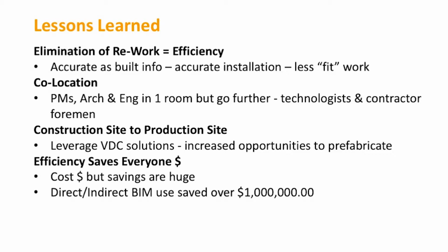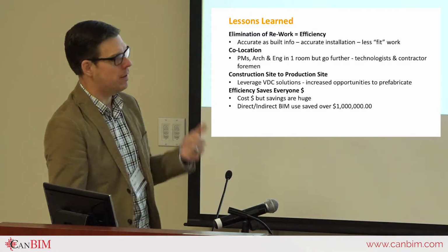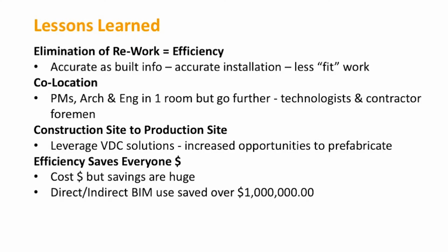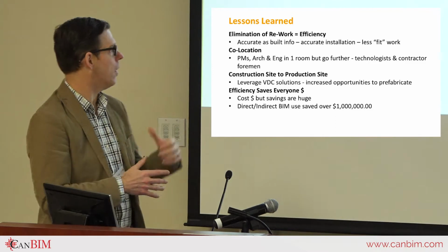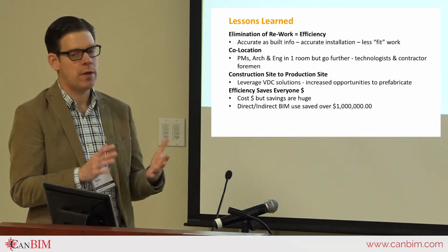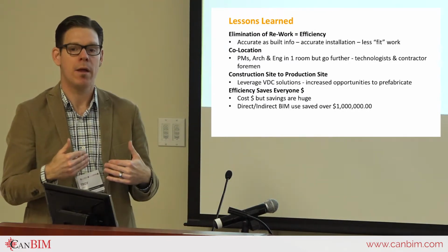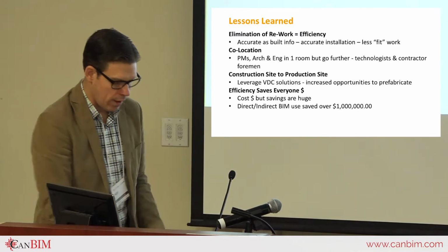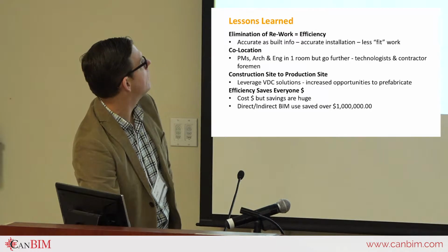And then, construction site to production site. Being able to use the ideas that come out of the BIM environment to create efficiencies through prefabrication, different things like that, and then fundamentally cost savings. We did a bit of an analysis with the general contractor, which is Shandos Construction, and the owner to figure out how much we think we saved by using BIM as robustly as we did. And we figured we saved over $1 million when it was all said and done, from the client's money to our consulting team time. That's what that $1 million equals. So it can work very, very robustly if you do it well.